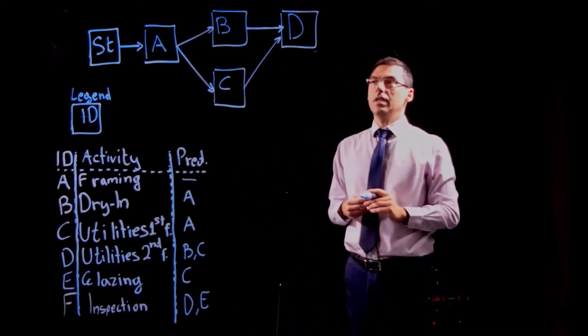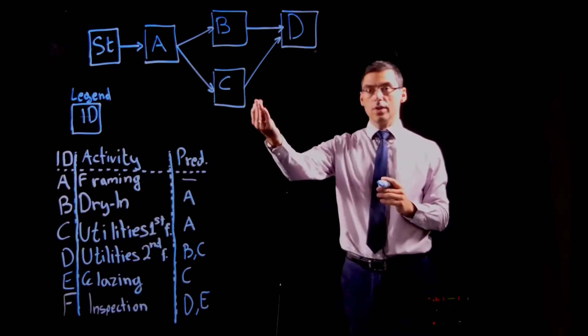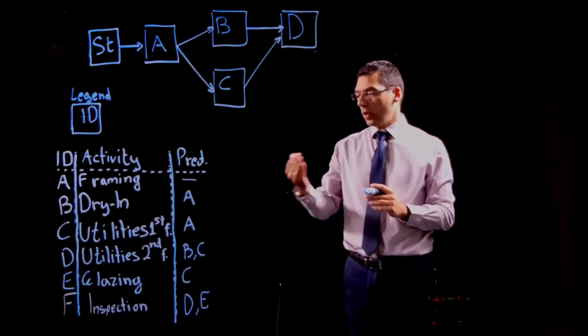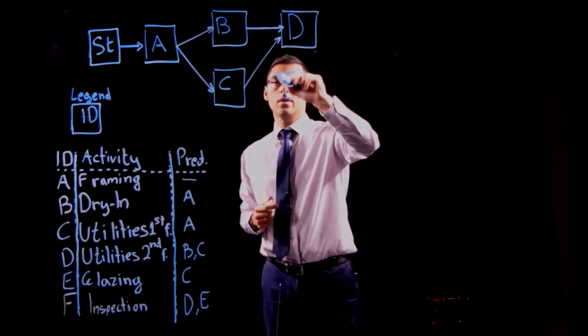Next one activity E. Activity E has a single predecessor activity C. I check it's already on the network so I can place activity E as well. There you go.